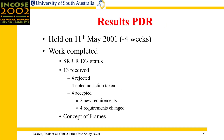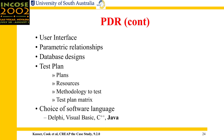By the time we got to PDR, we were four weeks behind schedule. We had processed the review item discrepancies from the SRR: thirteen had been received, fourteen had been rejected, four had been noted but no action taken as they dealt with items out of scope, four had been accepted, two were new requirements, two requirements had changed, and the students had been introduced to the concept of frames. A prototype user interface had been developed, the parabolic relationships for communication links had been developed, some database designs were complete, parts of the test plan were done, and the software language had been chosen — Java — following a sensitivity analysis.